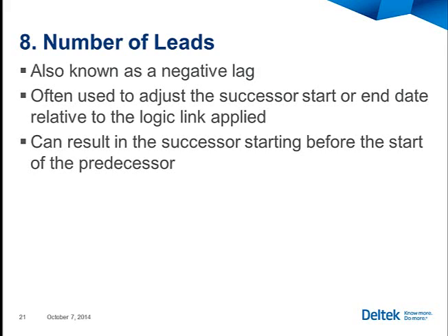I see these used very often to crash a schedule and create delivery time frames that are faster than the plan was actually made, but we see this as a substitute for applying the right resources to actually shorten activity durations, rather than what we're doing here, which is overlapping activities and running activities in parallel that may very well either not be able to be performed in parallel or are performed very inefficiently if they're performed in parallel. So we're not saying this is wrong, but when we see this, we see projects that didn't succeed.